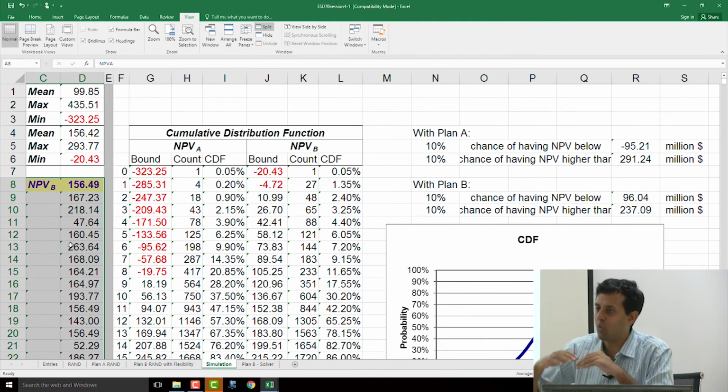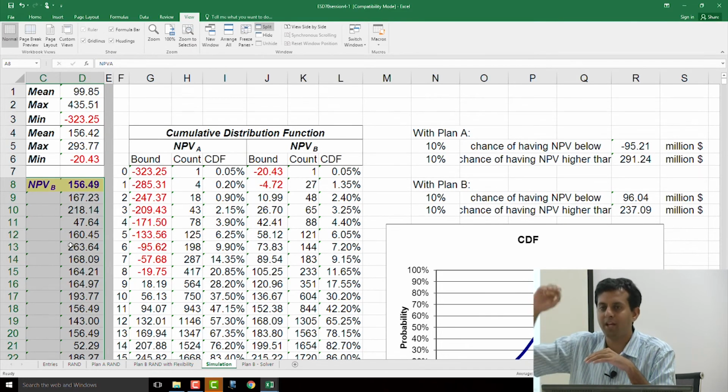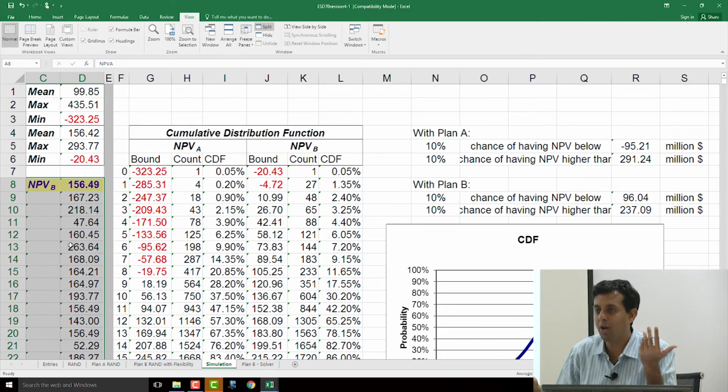So there are 3 options. One is you build 6 and you're taking a gamble. The other is you say, I'll build 3 today, but I'm committed to building 4 next year, 5 the year after, 6 the year after, where again you're incurring extra costs for the reconstruction and you may not get the benefits.